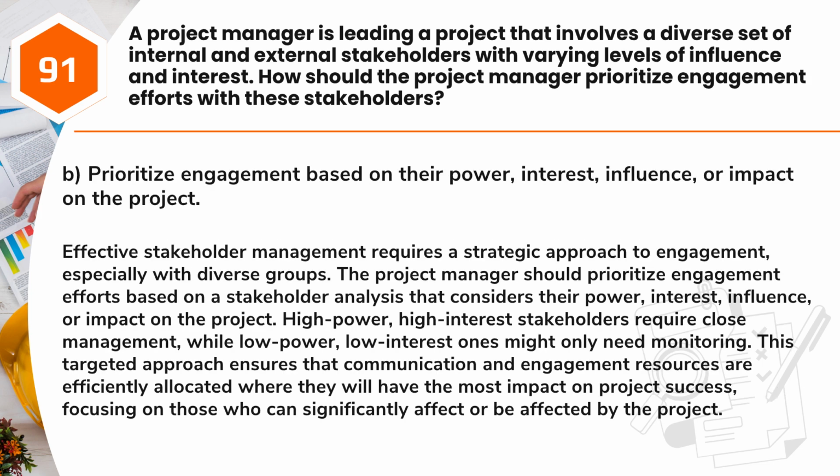Answer: B. Prioritize engagement based on their power, interest, influence, or impact on the project. Effective stakeholder management requires a strategic approach to engagement, especially with diverse groups. The project manager should prioritize engagement efforts based on a stakeholder analysis that considers their power, interest, influence, or impact on the project. High power, high interest stakeholders require close management, while low power, low interest ones might only need